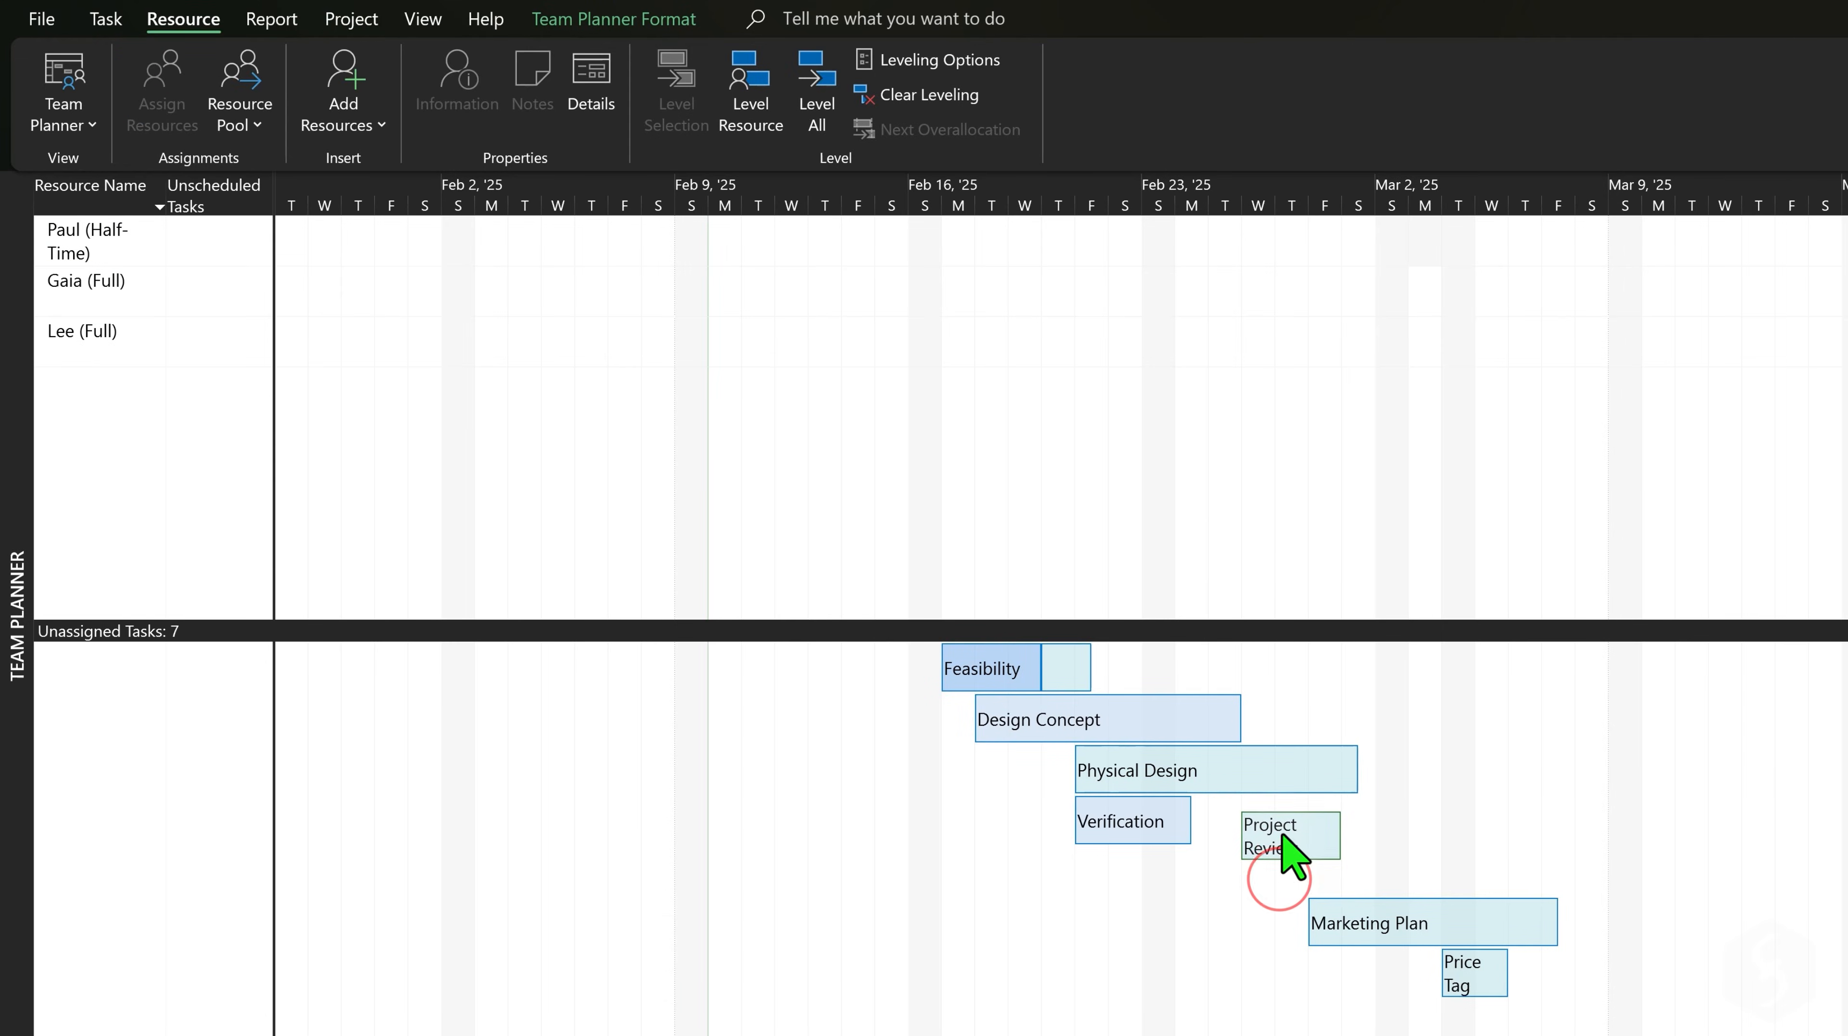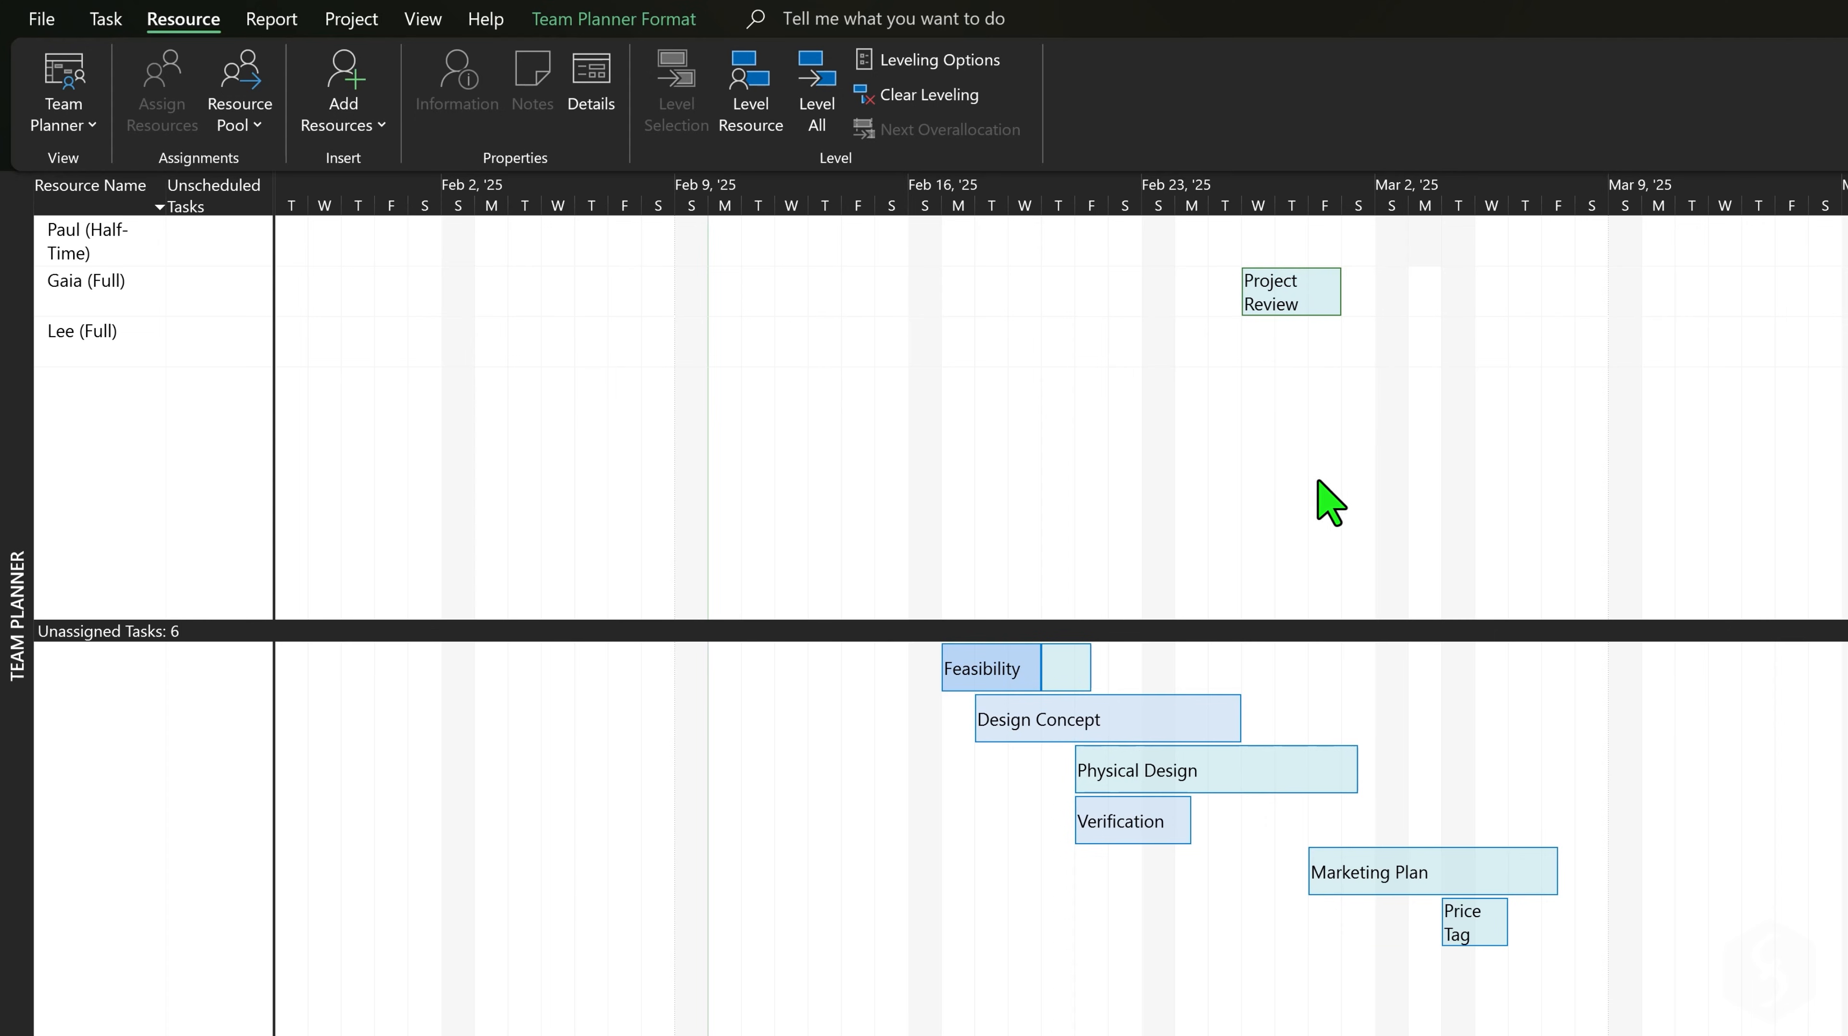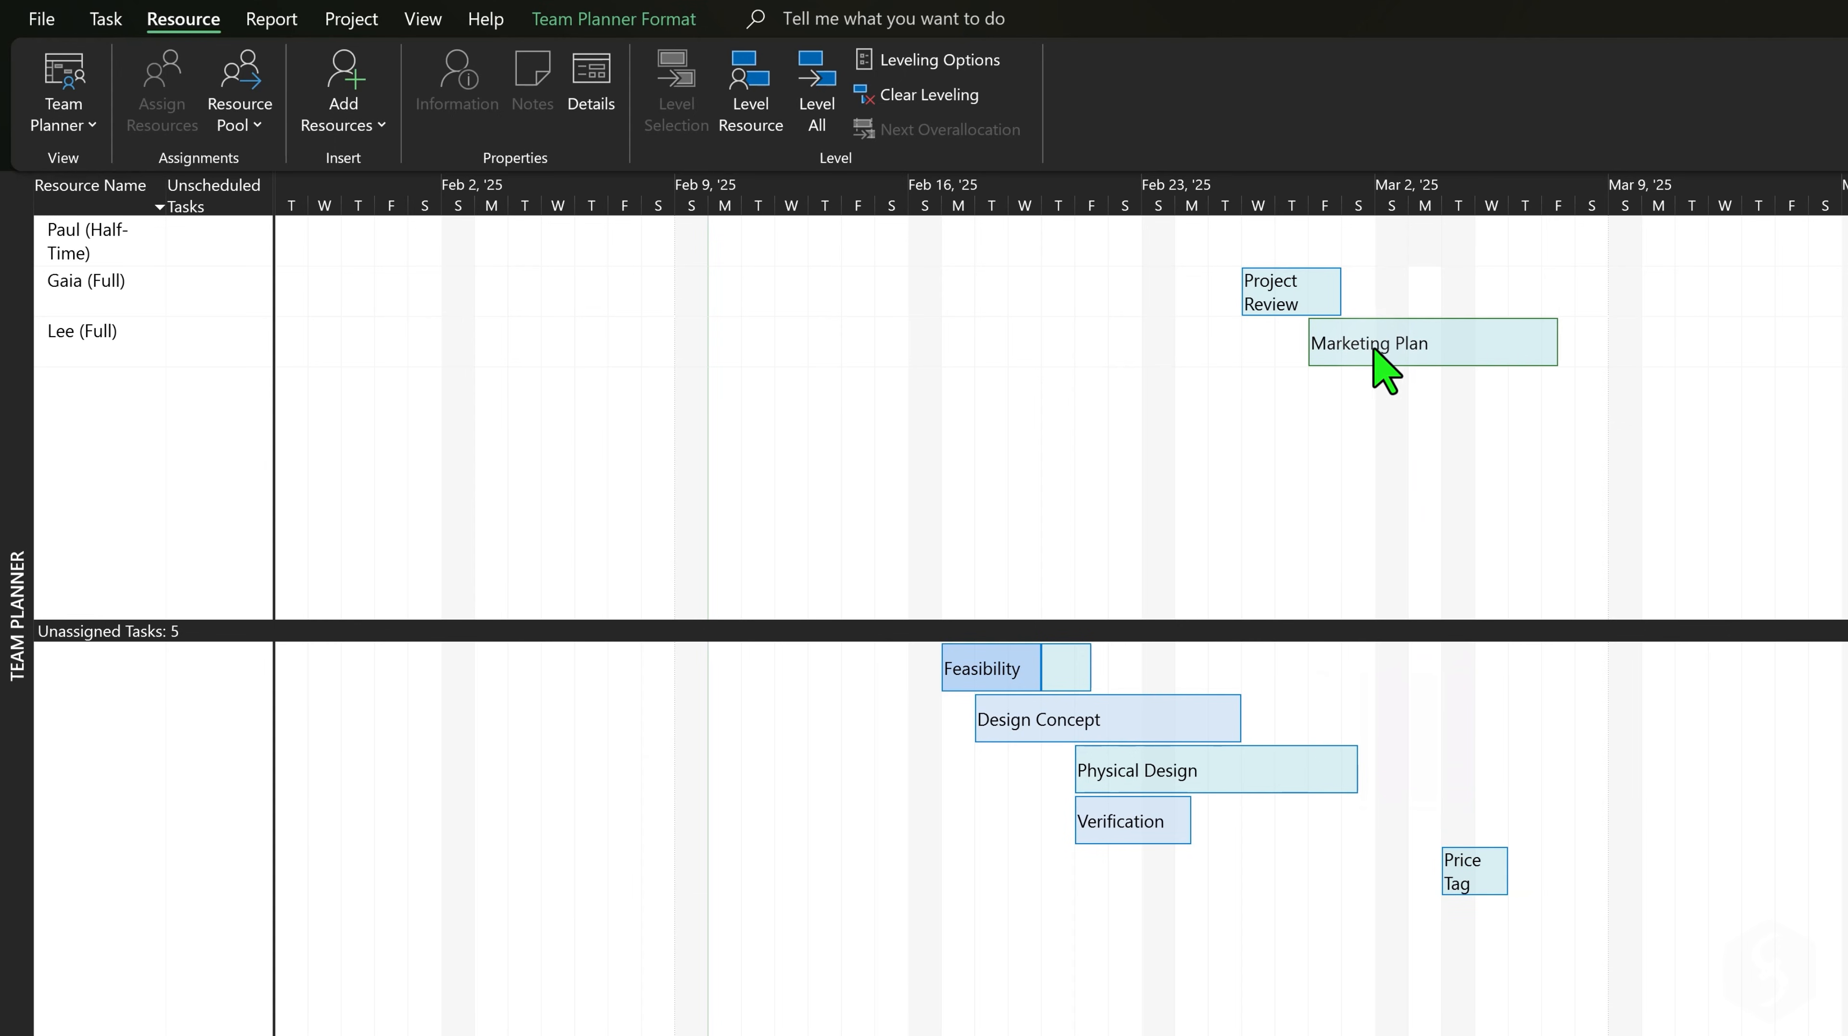Once you define the team members, assign tasks by dragging and dropping them properly. Make sure to respect their original time placement to meet constraints and dependencies already set in the Gantt chart.